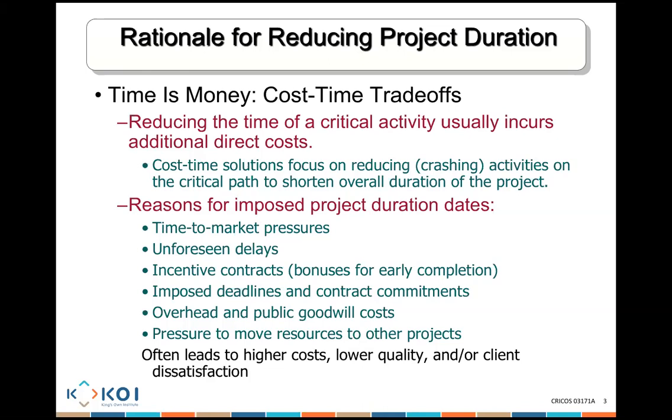The cost-time solution focuses on reducing, or crashing, the activities on the critical path. In other words, if you crash an activity that is not on the critical path, you are not going to actually win anything. You basically just wasted your resources. So you need to be very clear about working on reducing the tasks that are on the critical path.